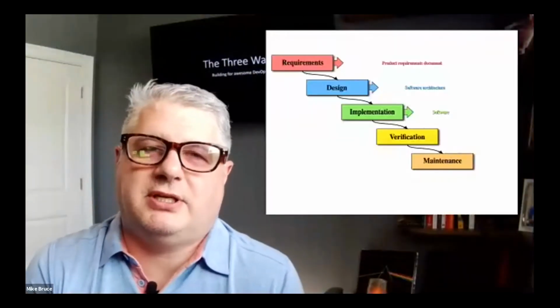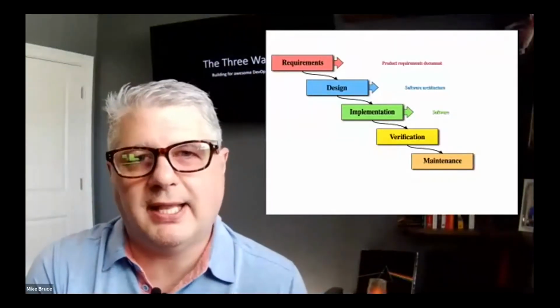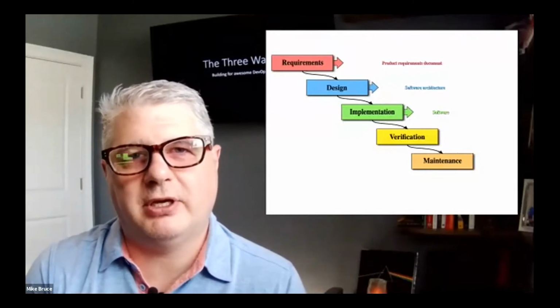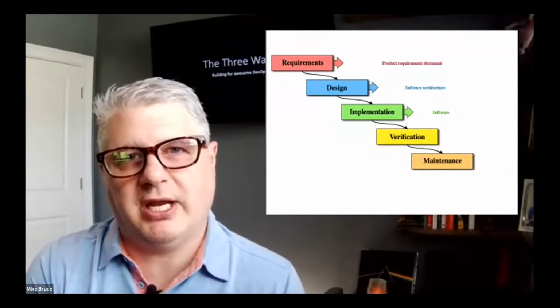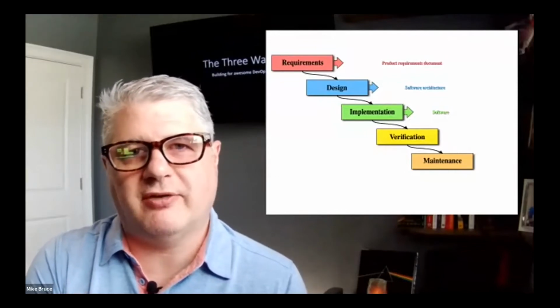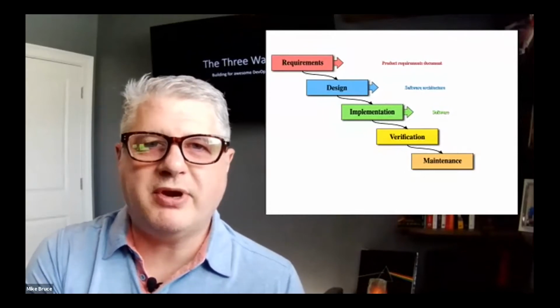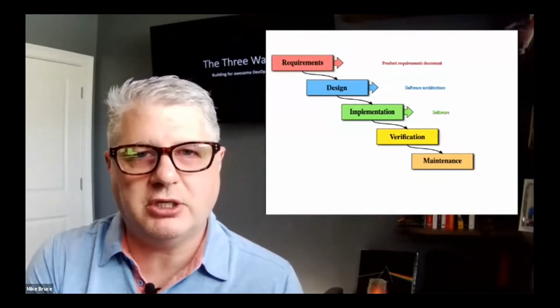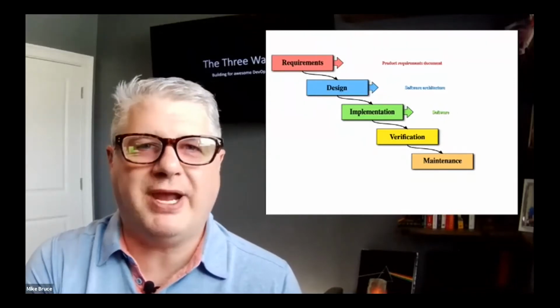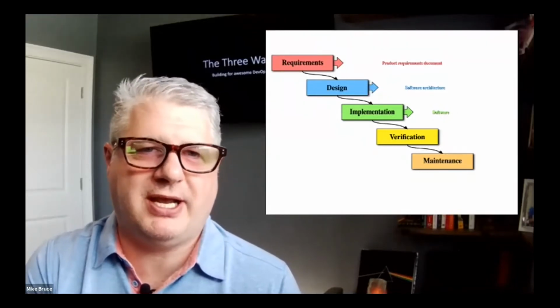So as you can see, when we have to deliver a lot all at once, we may not get the full benefit of everybody that happens to be in that chain or in that cycle or each section of our Kanban. When we break that down into smaller chunks of manageable things, we also reduce the amount of wait time that the next person in the chain has to deal with.